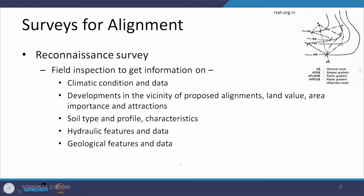Climatic conditions and meteorological data can be obtained for the last 5 or 10 years to identify what may happen in future. Any developments which have taken place, whether along the alignment or on its sides, can cause a change in land value. If land needs to be acquired for road construction along a specified alignment, this will add to the project cost. Any other developments creating attractions also need to be looked at in terms of traffic demand.